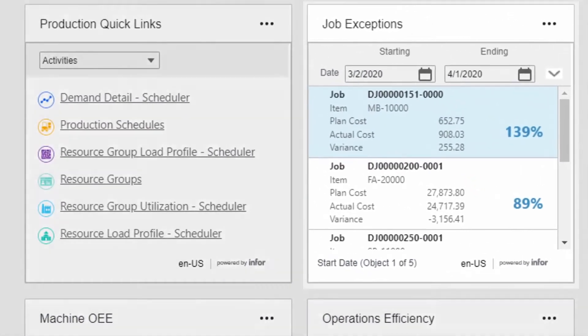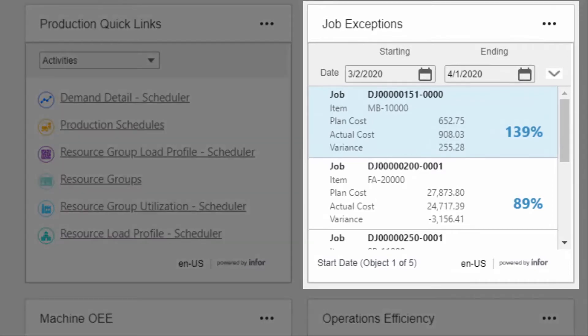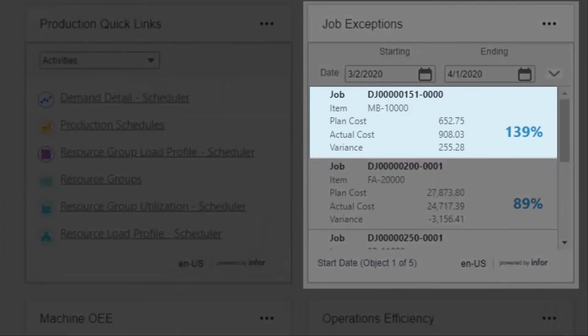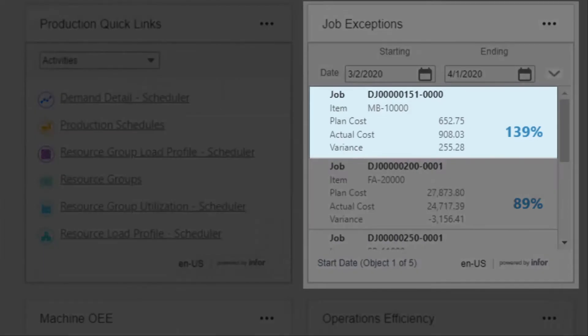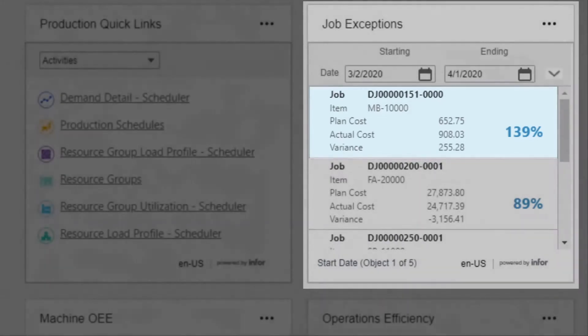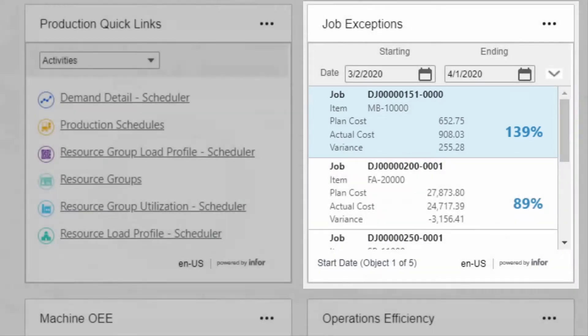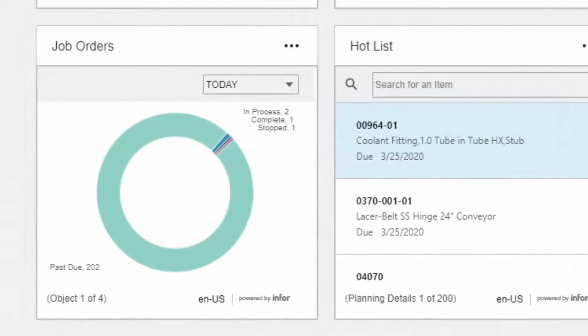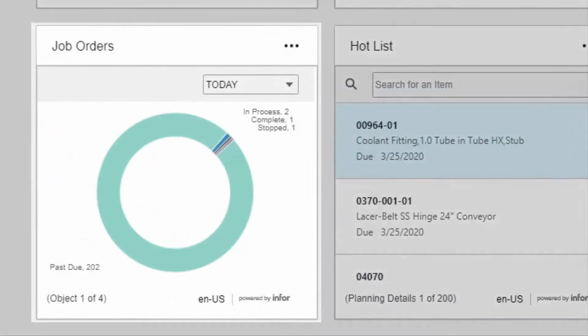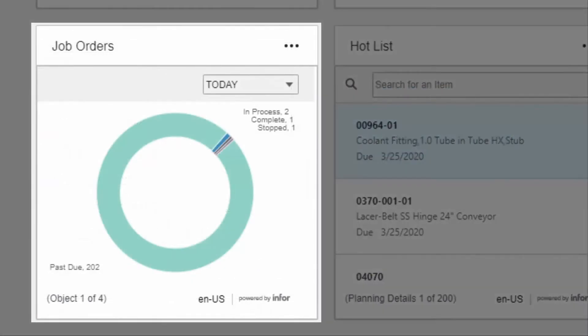Identify and drill into exceptions and see where a job is diverging in planned hours, quantity, or cost before it's finished and too late to take corrective action. Keep a handle on the progress of jobs to ensure you're meeting customer expectations.